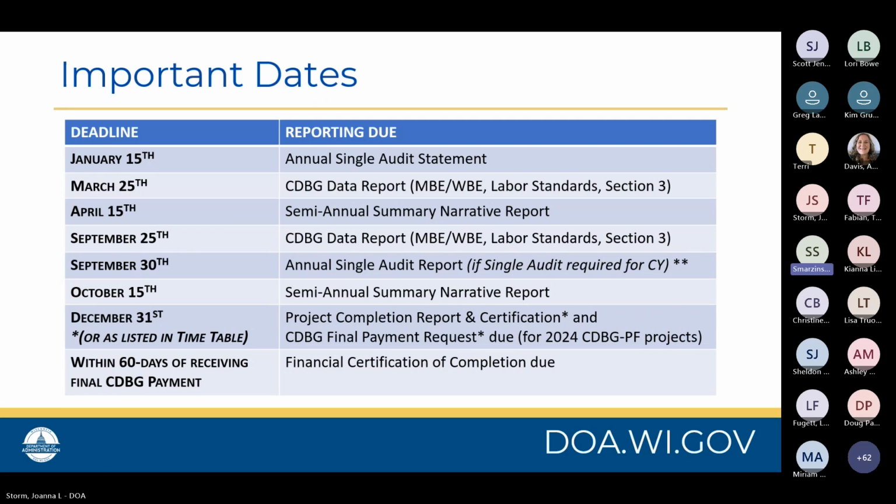For those that report semi-annually, some projects require quarterly reporting. Once the project is completed and final documentation has been submitted, a reminder that final financial documents and the certification of completion is due within 60 days to officially wrap up your paperwork.